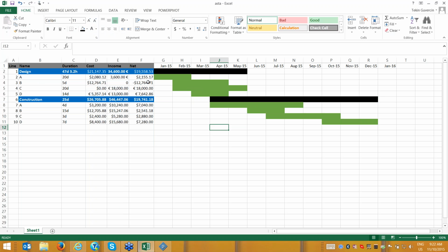But we created this, and we also have cost, and we can distribute the cost. For example, we can say that it is 2000 and I would like to spend 25% during January and spend the remaining in February, so that I can distribute the cost based on time and have the cash flow, which I can just summarize here based on this. So I can go and distribute it here, this one divided by 3, and I can just repeat the same one. As you see, I'm not good in Excel, so I am just selecting this one and dividing by 3.